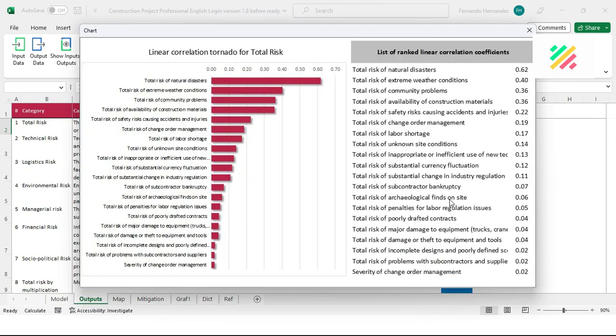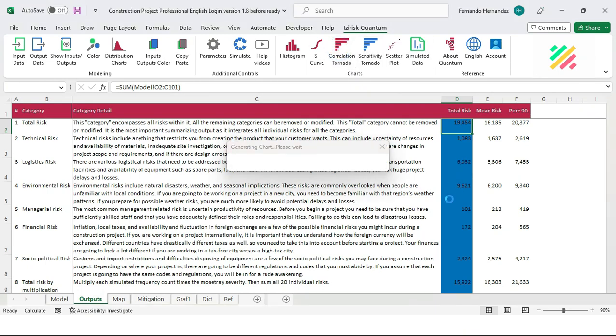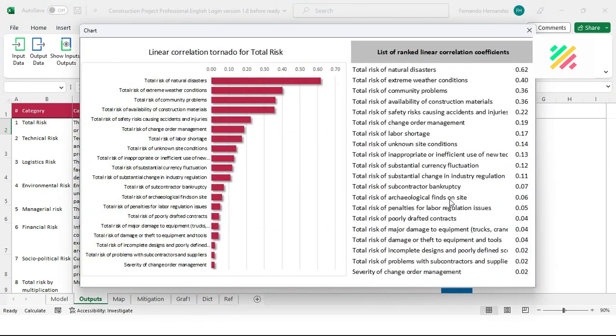In this way, by consolidating the correlation indices between each of the risks and the total aggregate risk, we are able to obtain a relative measure of the importance of each risk when it comes to impacting all of them. These coefficients cannot or should not be added in their interpretation, but they do give us a first approximation, much better than the chromatic classification, to the relative importance of each risk with respect to its total aggregation.